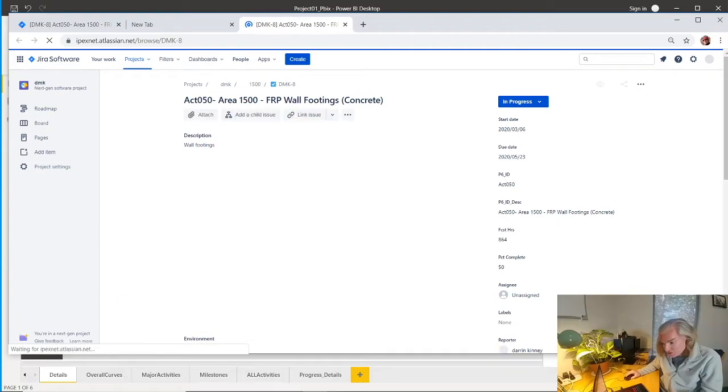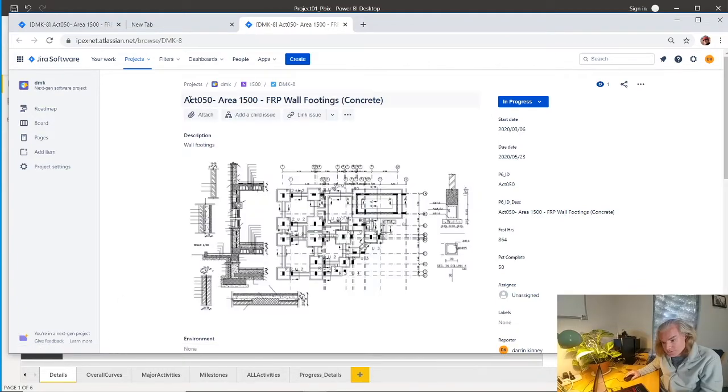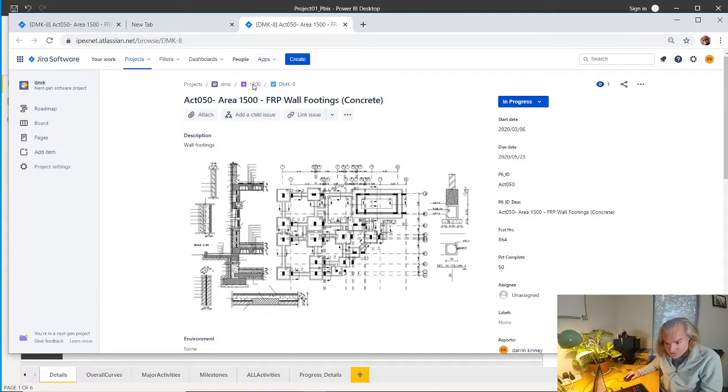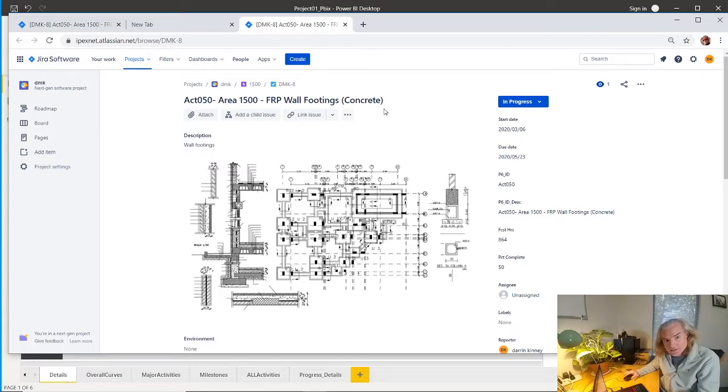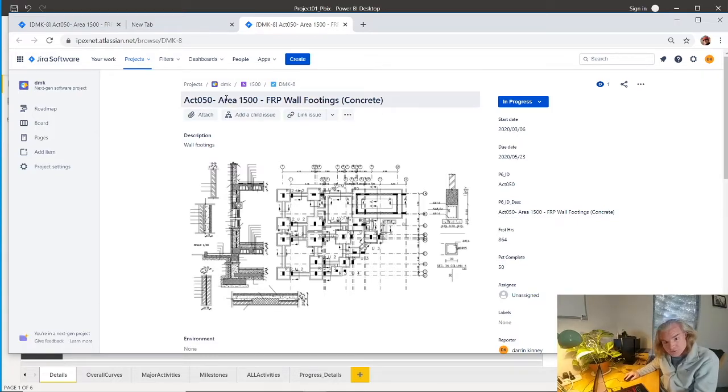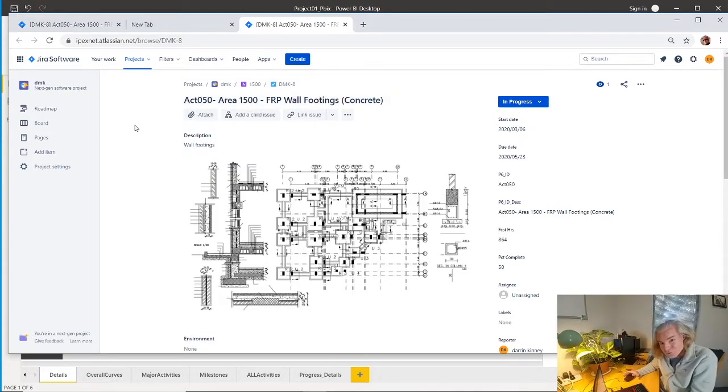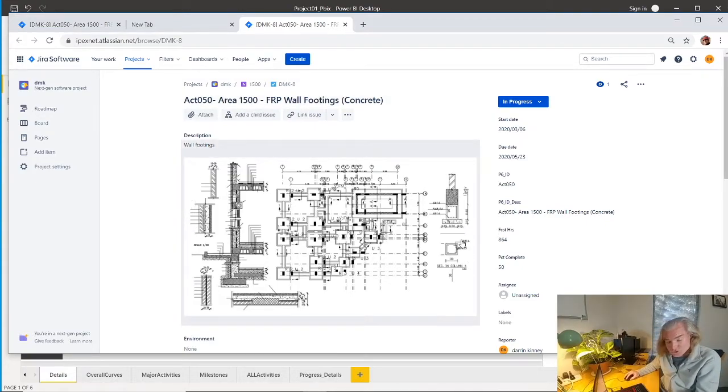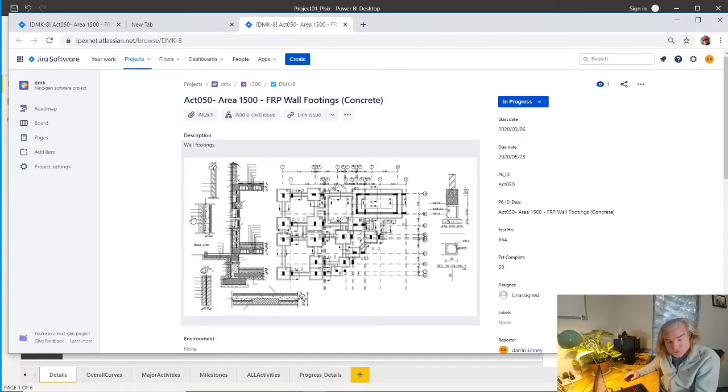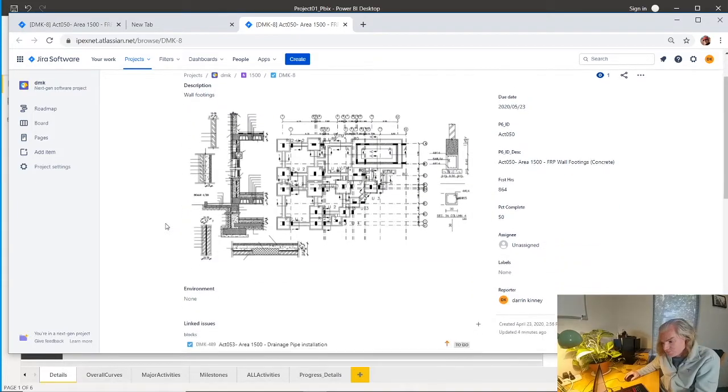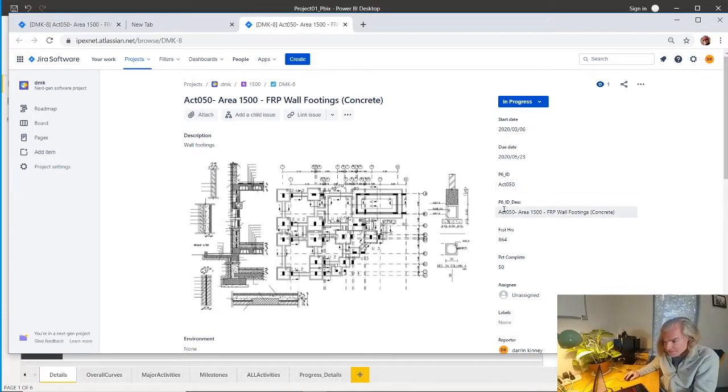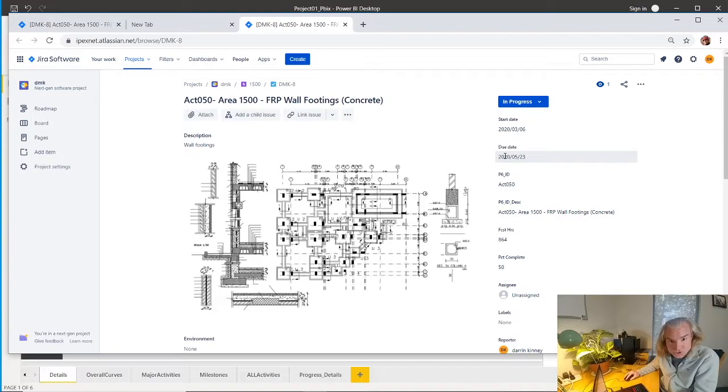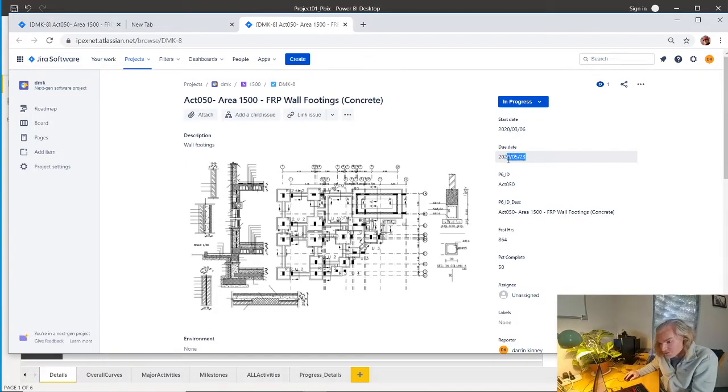We jump into Jira and we can see we have a task sitting under Epic 1500. It's exactly the same as in our dashboard and would be the same activity in Primavera, but now you've got so much more. You can do screen prints of layout drawings. You have information related to your schedule ID, activity description, start date, due date. In this case, you'll notice this says May 23rd, which is different from what it said in Primavera.